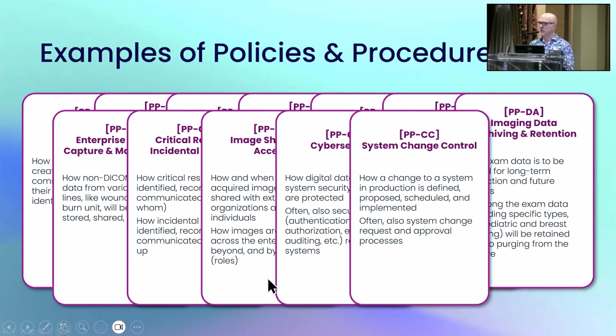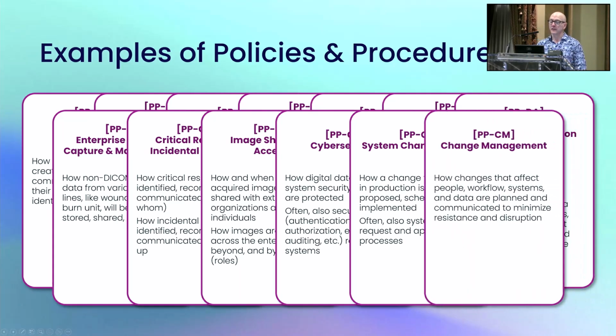System change control, when somebody wants to put something into production on Friday night, do you have controls on how to back that out? How do you get approvals for it? Assess the impact. And finally, change management. And people use the term change management a lot, and I'm not just talking about, oh, we got to add it to the intranet or we're going to send it out in the newsletter that nobody reads. This is really about examining those roles that are affected by what you're changing and making sure that they know how to adopt the change, why you're doing the change, and they're buying into it and accepting it.